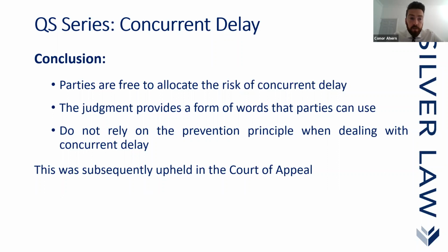And finally, what the TCC was saying is that parties should not rely on the prevention principle when dealing with concurrent delay.